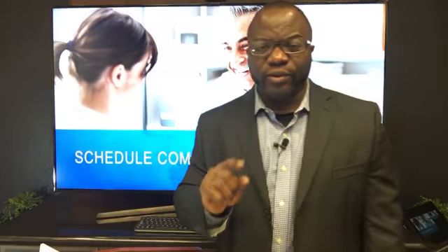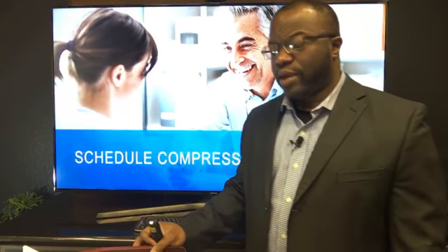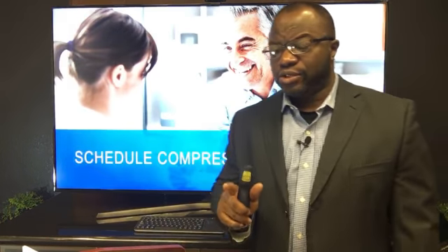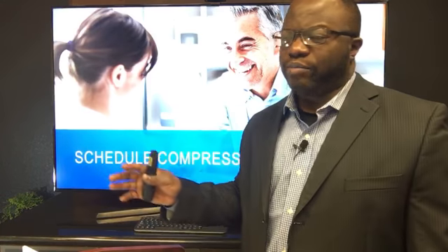So be careful on the exam for questions that allude to develop schedule versus those that allude to control schedule. You might want to look out for them because there's a difference between you are building your schedule and you realize that you would need to carry out a task sooner. You decide to plan to add more resources. Which process is it? You're not in control schedule because you are not yet live on the project. But if it says in the middle of the project, you discover a problem, and so on.